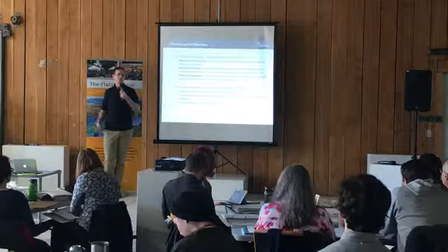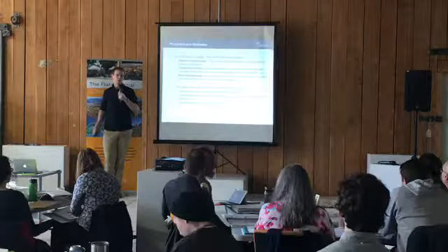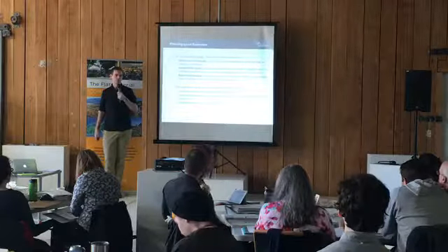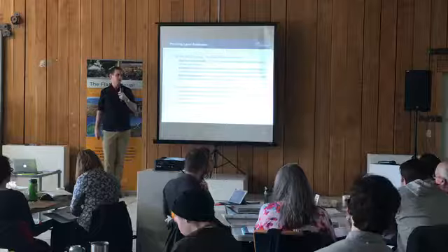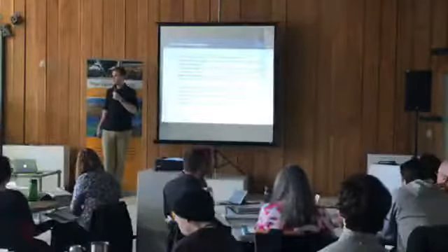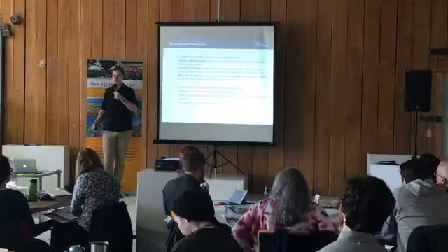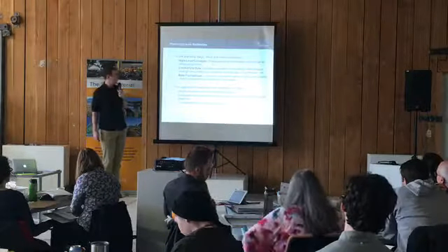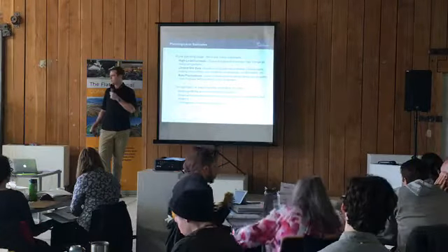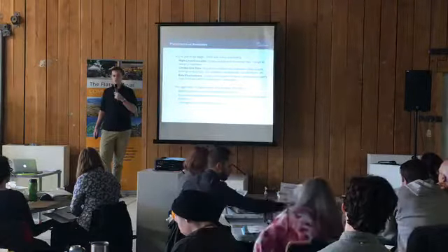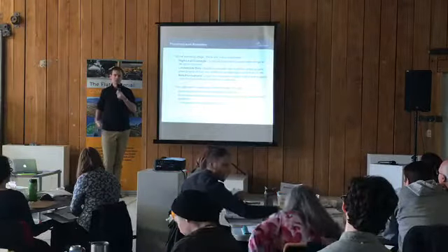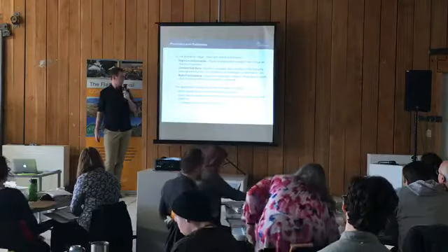We're also working with limited site information in terms of topography or soil conditions, where all of this has been subject to some review, but there's been no drilling at each of these alignments to fully understand soil conditions, for example, so we've had to make a number of assumptions about what sort of mitigation measures would be required there. And as Steve touched on, rate fluctuations in construction materials, labor, and property costs can all change over time as the schedule gets delayed and can have the potential to escalate.